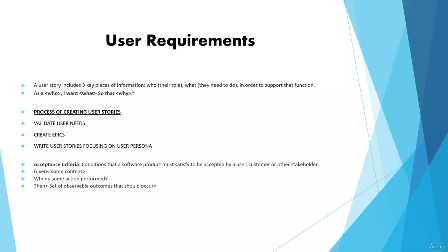So if your project is 100% Agile, then the document which can serve you is the product backlog. The product backlog is a prioritized backlog containing the end user requirements. It is also a prioritized list of features like requirements, bug fixes, and non-functional requirements, covering a short description of all the functionalities desired to be implemented to deliver the working, potentially incremental product software. So, the product backlog is used in place of the traditional BRD document or SRS document.